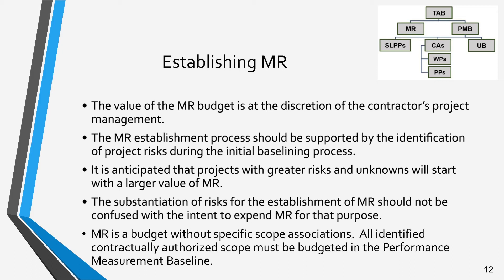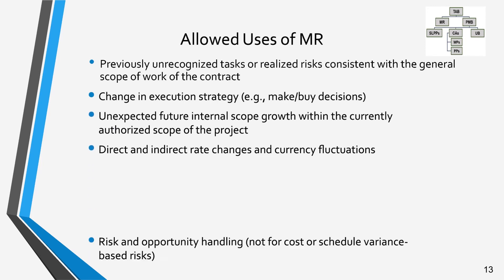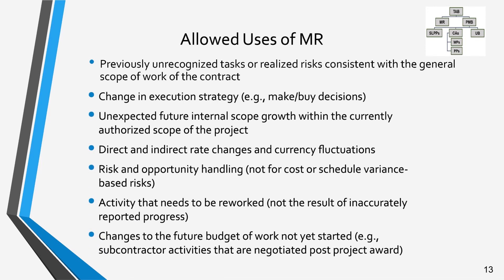MR is a budget without specific scope assumptions. All contractually authorized scope must be held in the performance measurement baseline and distributed to control account managers in a timely manner. Generally, MR can be used by the contractor's PM to plan or re-plan future effort not yet started. It may be used for previously unrecognized tasks and identified risks that are consistent within the scope of work of the contract. All risks, unrealized and realized, are usually identified, quantified, and tracked through a risk register.